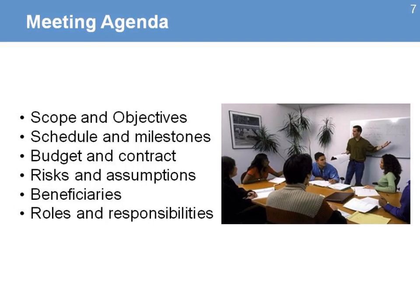For your agenda, you will start by presenting the scope and objectives of the project — why we have the project and what we're trying to solve. You will also present information on the schedule and milestones, budget and contract, risks and assumptions, information on beneficiaries, and the roles and responsibilities of all the people present during the kickoff meeting.